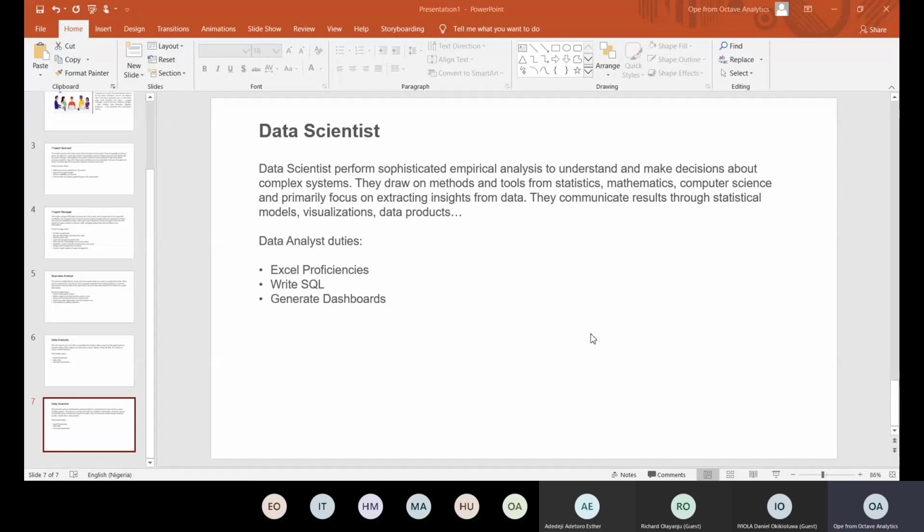According to your description, does that mean Scrum meeting holds every day? Yes. It should hold every day, because once you start skipping Scrum meetings, people would not take it seriously. So the Scrum meeting should hold every day, and it should be very short. What is recommended is 15 minutes max. Okay, ma. Thank you.